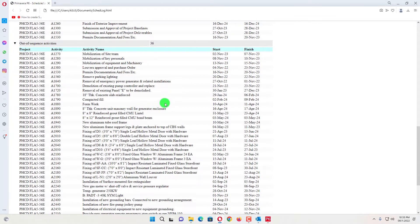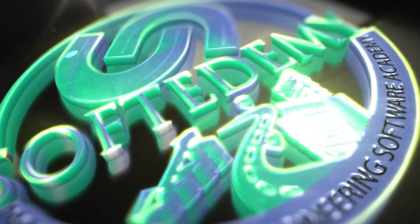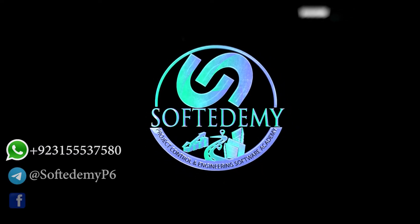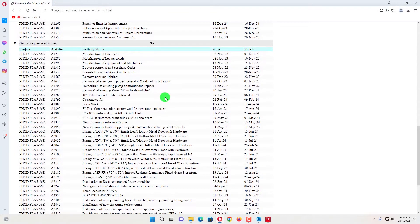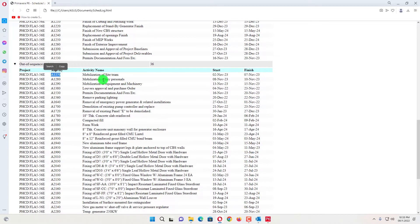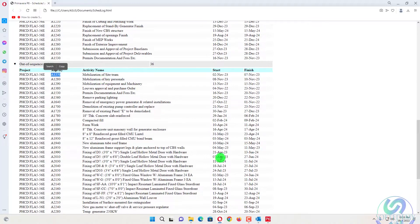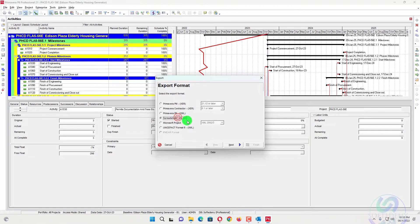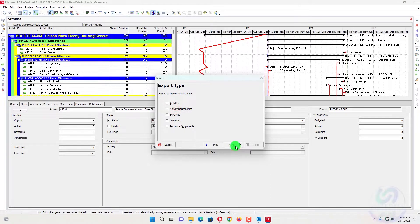I have detected the out-of-sequence activities here, and now I will show how you can filter and resolve them. We will go and find out the 36 activities and resolve them easily. The first method: you can search these activities and remove their relevant out-of-sequence. I will go into Primavera P6 and export the file into XLS — that is an Excel format — as an activity relationship file.